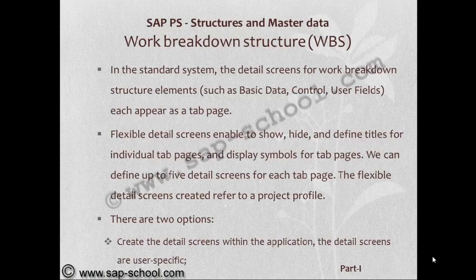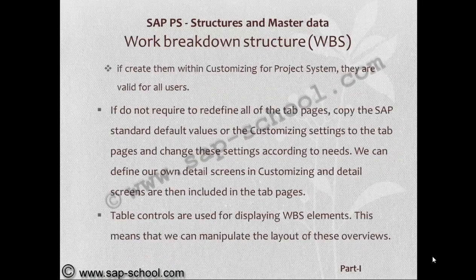The flexible detail screens created refer to the project profile. There are 2 options. Create the different screens within the application, in which case the detail screens are user specific. If we create them within customizing for the project system, they are valid for all users.